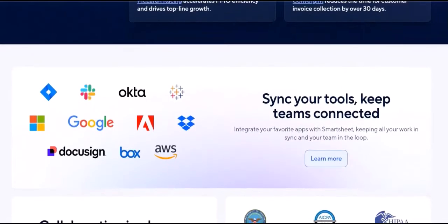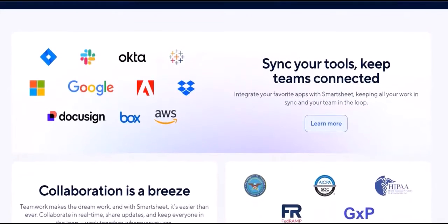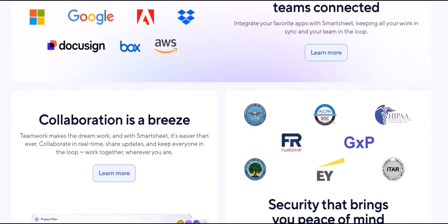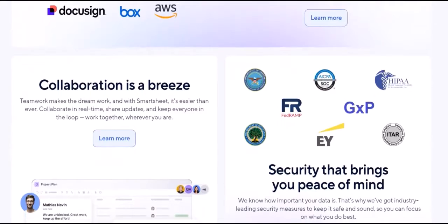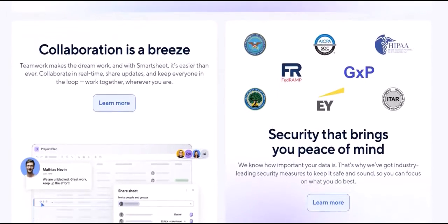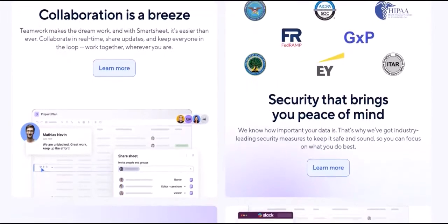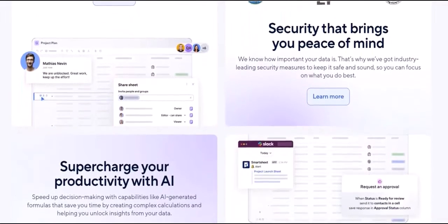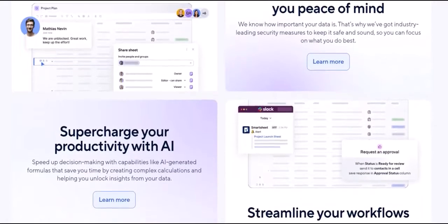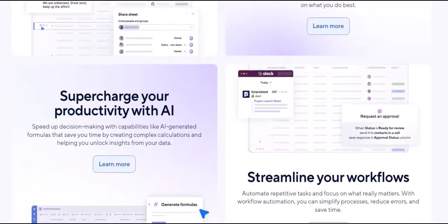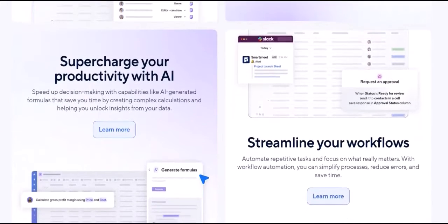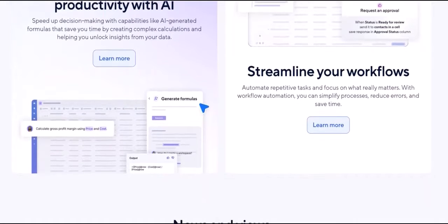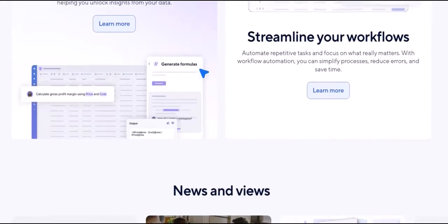Format X-axis. Right-click the horizontal axis, Format Axis, and set minimum and maximum bounds to your project start and end dates. Format bars. Right-click the blue bars, representing start dates, Format Data Series, and set Fill to No Fill and Border to No Line. Add duration bars. Add your duration column to the chart data. Format task names. Right-click the vertical axis, Format Axis, and select Categories in reverse order to list tasks top-down. This will give you a basic but functional Gantt chart.